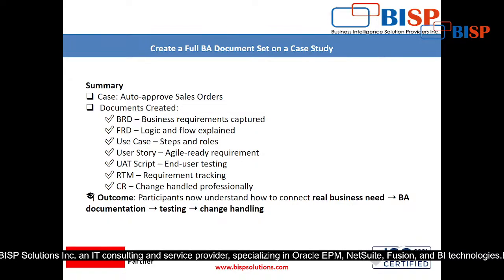And then the change handling. Now this change handling will also take 2 to 3 weeks. The reason is that the client has asked for the change, so 1 week will be required, and 3-4 days will be required to make the changes, whatever the new changes are demanded. Minimum 3 to 4 days, right?